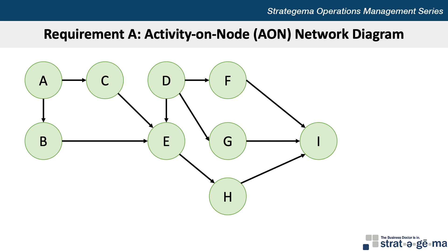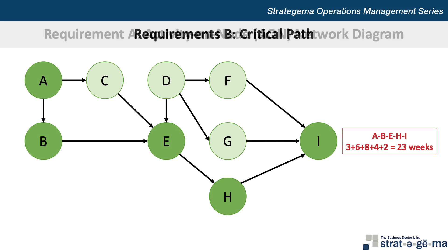There are many different ways you could draw a network diagram, so if yours looks a little different, that's fine. Next, we want to determine what the critical path is for requirement B. The easiest way to do that is to simply map all the activities through the network and add up their task times. Our first path through the network is A-B-E-H-I with task times of 3, 6, 8, 4, and 2 weeks respectively, adding up to a total path time of 23 weeks.